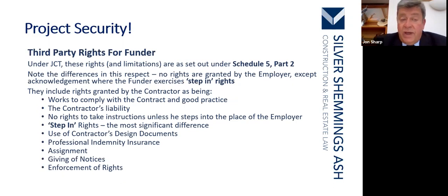Third-party rights for any funders. These rights and limitations are set out under Schedule 5, Part 2. Note the differences in this respect. No rights are granted by the employer except acknowledgement where the funder exercises step-in rights.